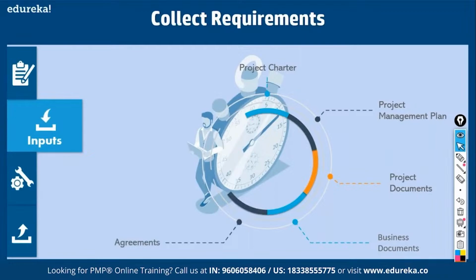Then agreements. What are agreements? Agreements are the agreements that you enter into with a customer. Let's say you are ABC company, and you get a contract from XYZ company to deliver a product. The customer would have entered into an agreement with you. The agreement would contain a statement of work. What is a statement of work? A statement of work is a narrative description of everything that you, ABC company, must deliver as part of the project. So it contains all the requirements. You look into agreements to see what you have to deliver. That will be the basis for collecting requirements. You have to go and talk to the stakeholders based on this statement of work and amplify the requirements in a much more detailed manner.